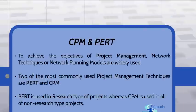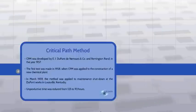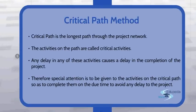Let's begin with the Critical Path Method. CPM was developed by EI DuPont, the numerics company, and Remington Rand in the year 1957. The first test was made in 1958 when CPM was applied to the construction of a new chemical plant. In March 1959, the method was applied to a maintenance shutdown at DuPont works in Louisville, Kentucky, and the unproductive time was reduced remarkably from 125 hours to 93 hours. From here on, the success of the critical path method began.